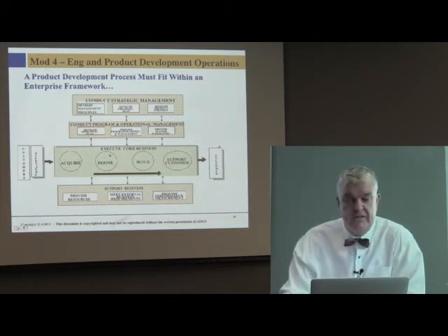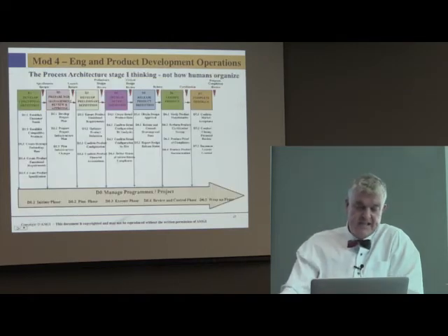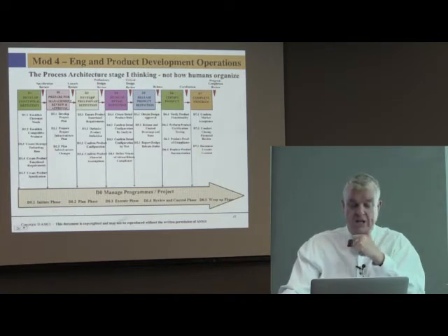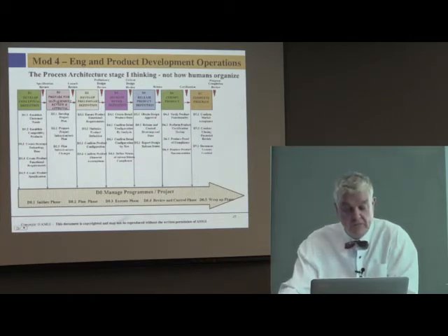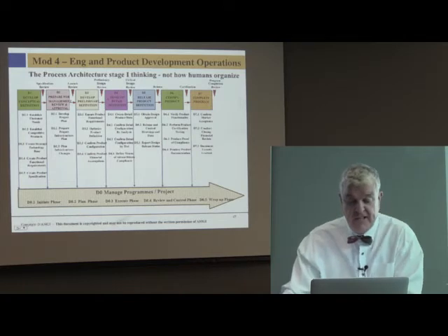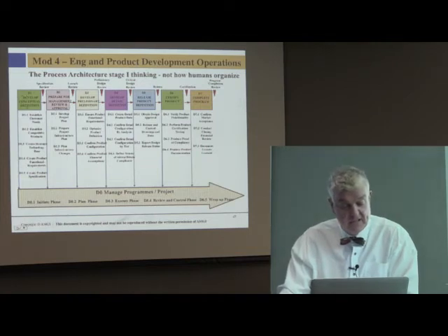So it's process-driven, process thinking, not functional thinking. This is an example actually from Bombardier. This was the very, very first draft of stage one thinking about how their phases of product development occurred. So concept definition into review, preliminary definition, detailed definition, and these were the milestones here. So they had milestone meetings. So then these were the sub-processes of that particular process.